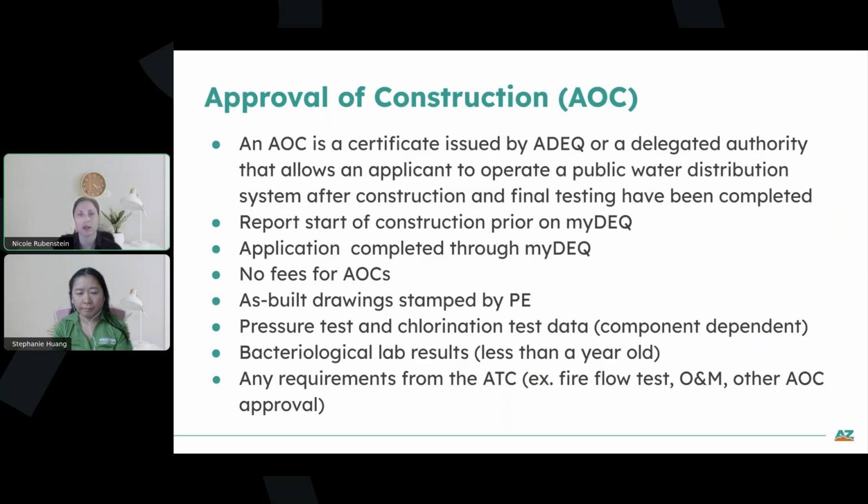So again, the application is completed through MyDEQ. There are no fees for the AOC, so the fees are just at the ATC stage. So if you were to request and get approved for priority review at the ATC stage, that would also apply for the AOC stage. So priority review for ATC will also lead to a priority review for the AOC.